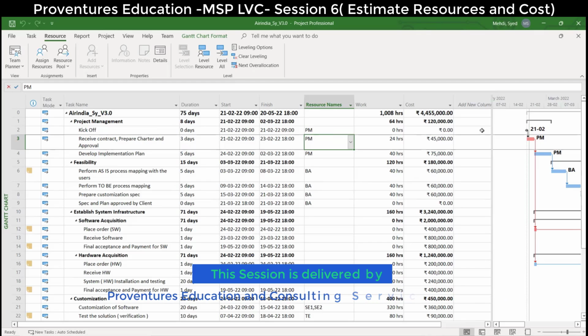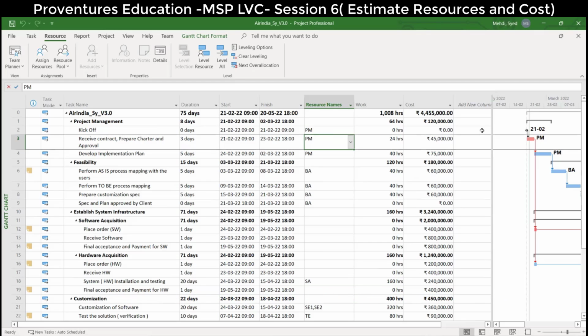If you are very sure about the project, and we have been doing the same kind of work, if it is a very simple project with a small timeline, then we can keep a margin like 20%. But it is not applicable everywhere. For projects of at least 6 to 8 months, we should ideally keep 15% on the safer side. Yes, that's a good contingency.